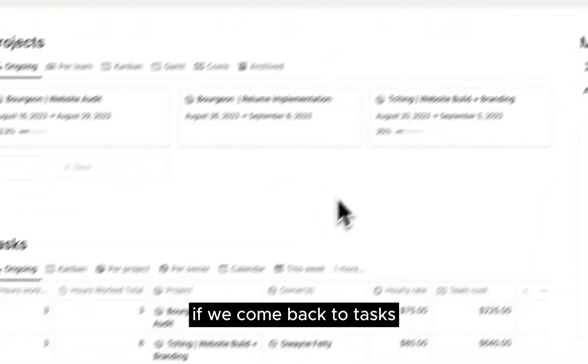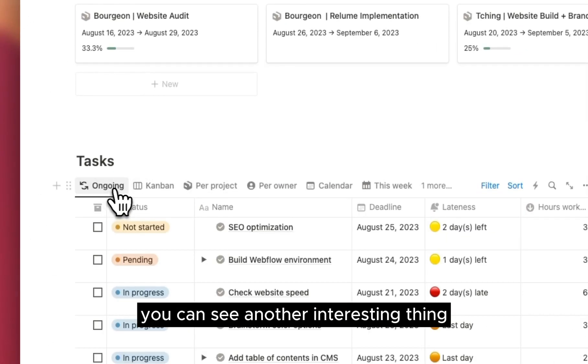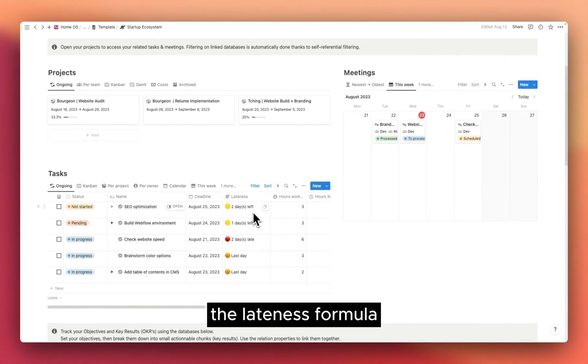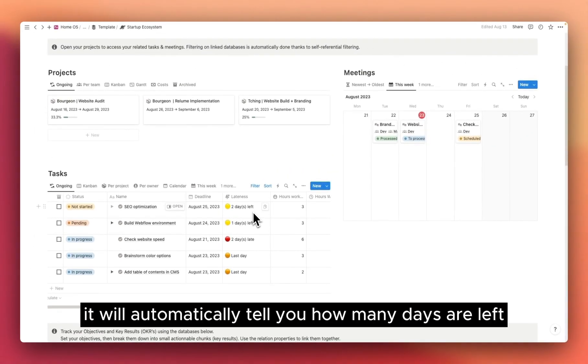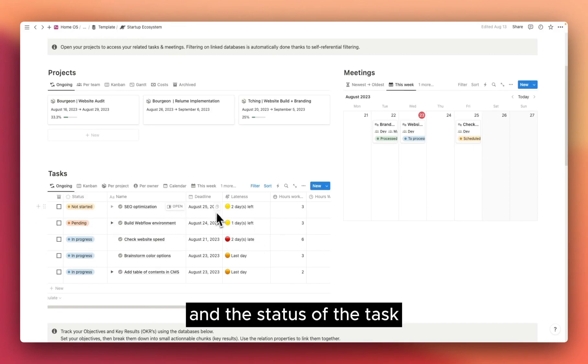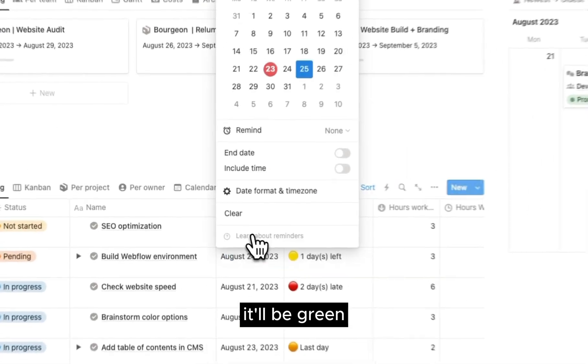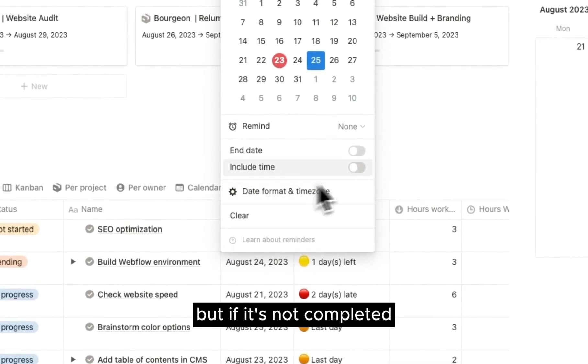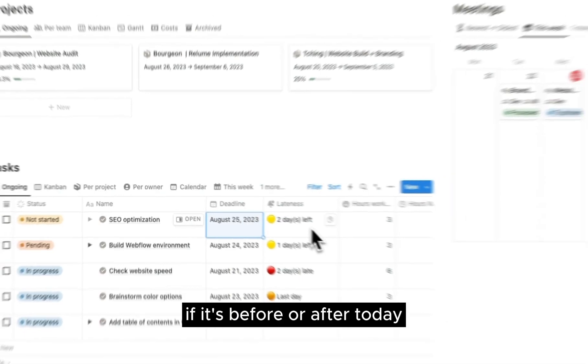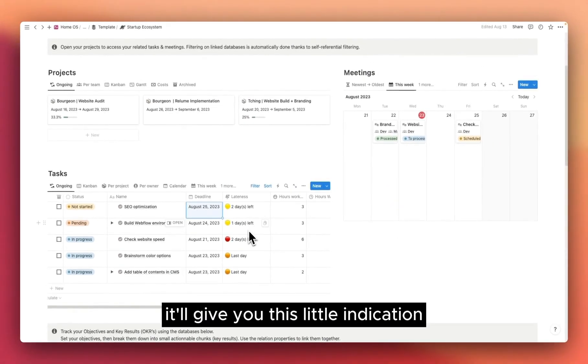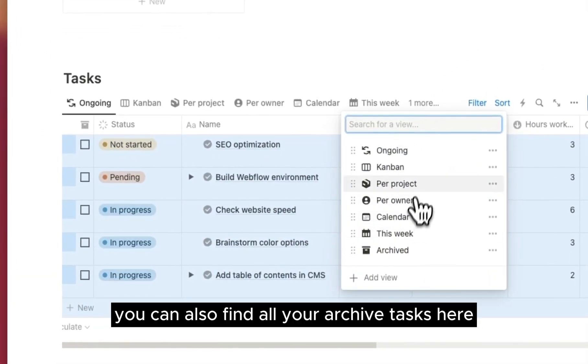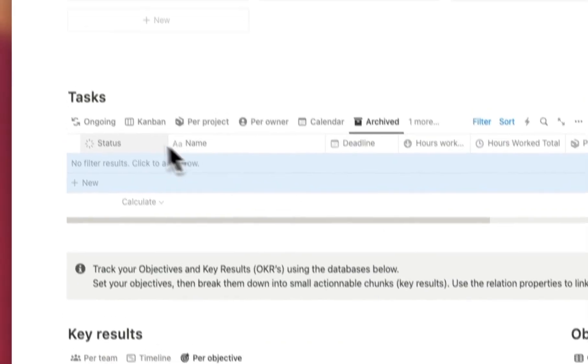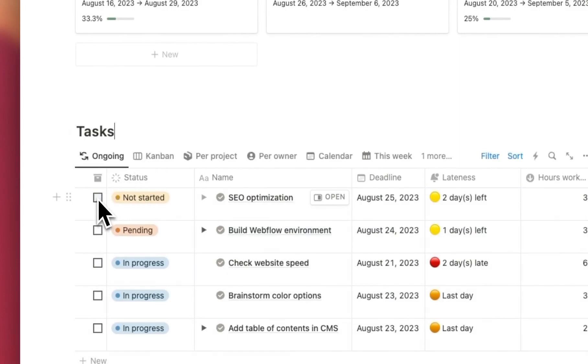If we come back to tasks, you can see another interesting thing, the lateness formula. It will automatically tell you how many days are left or late, depending on the deadline and the status of the task. If the status is completed, it'll be green, but if it's not completed, depending on the deadline, if it's before or after today, it'll give you this little indication, which is quite handy. You can also find all your archive tasks here. You can archive tasks using the checkbox here.